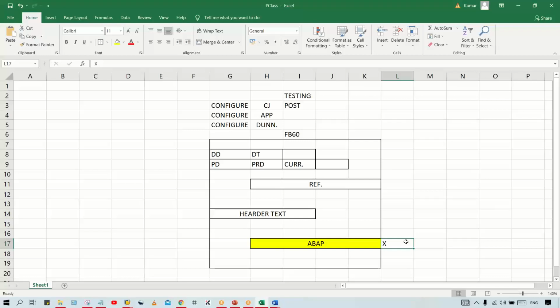Before that, if any approval is required, let's suppose, sometimes some clients will hire a senior consultant from their payroll, and they will say that whenever any developments are going to happen, whatever functional specifications are prepared by you people, first of all you have to send them to our technical consultant for approval. Once he or she approves, only then is it forwarded to the technical consultant for further development. So you have to follow those procedures, right?